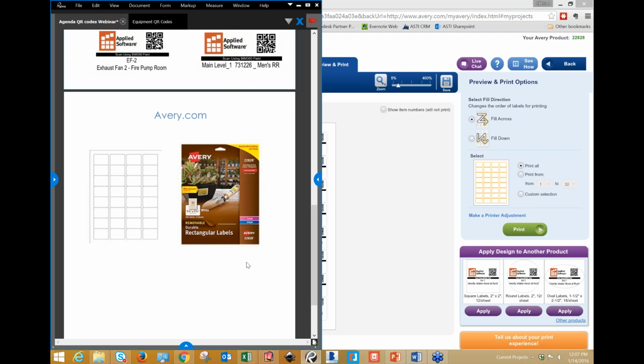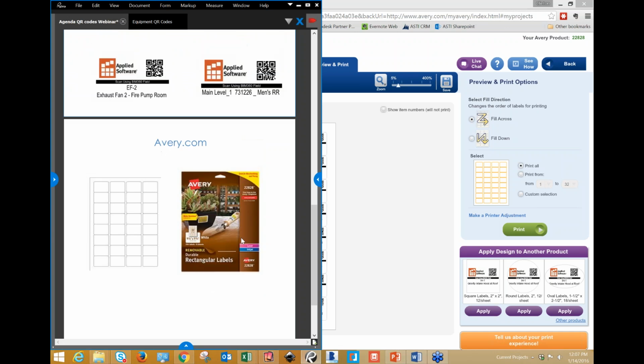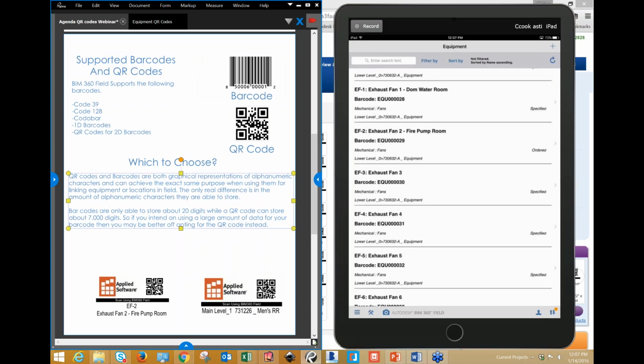I think I can show you here if I can get everything up. I haven't tried this, but I'm pretty sure this will work. So if there was one on site and I wanted to utilize it, you can see here that when you scan it, it'll tell you this code was not mapped to anything. And it's going to allow you to actually place the information in the barcode field for a piece of equipment, in which case you could then reference it again.